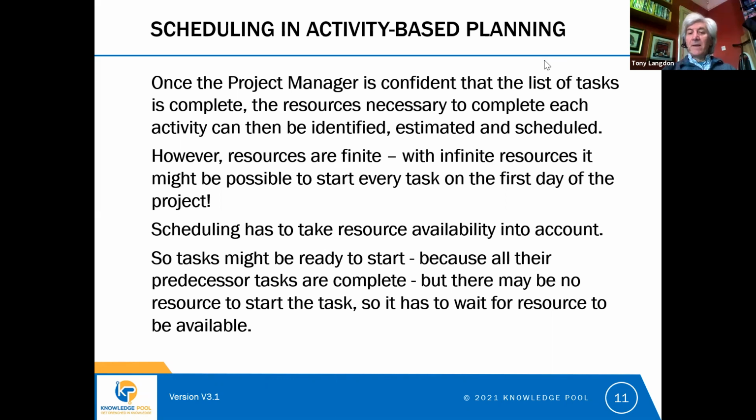And it can be the case that a task may be ready to start because all of the predecessor tasks, all of the dependent tasks have been completed, but there may be no resource available to start the task. And so it has to wait for resource to become available.